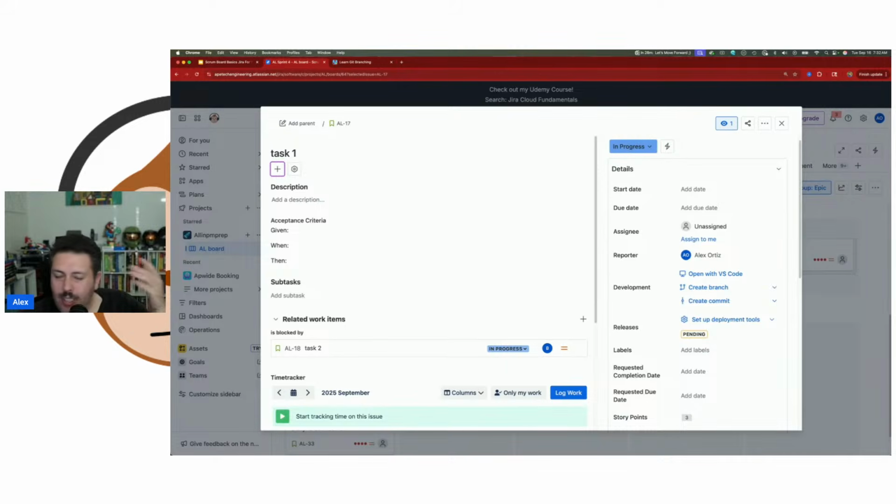And folks, in case you're in the back of the room not paying attention, this right here is how you bridge the world between your developers and your Scrum Masters, by them acting inside of their source code repository. Normally they're inside of Visual Studio Code and they're going to type in the command, git checkout -b and then the name of their branch, right? They don't have to come to Jira, but automatically, if you set up these automations, we can move the stories from to do to in progress.